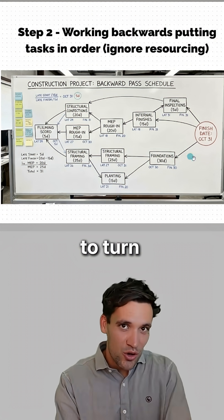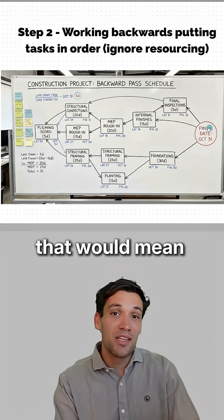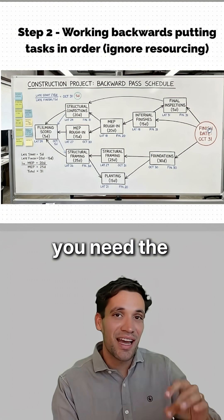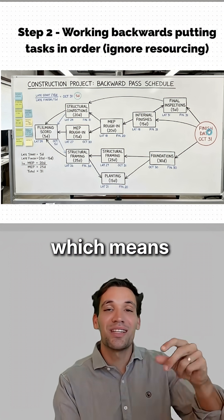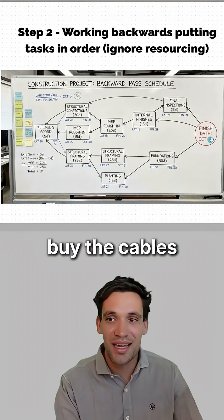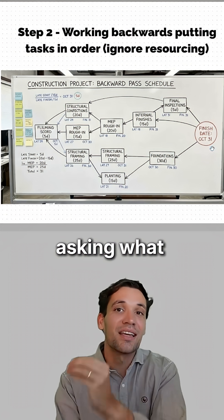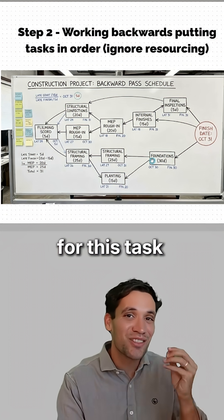For example, if you need to turn the power on on a certain date, that means you need the switchboard installed, which means you need the cables terminated and tested, which means you need the cables installed, which means you need to buy the cables. Work backwards from the finish date asking what needs to happen for this task to occur.